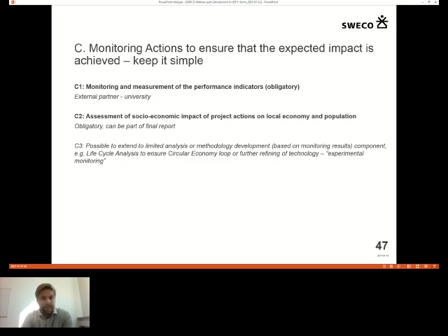Then the downside is that at least Swedish and German, many European universities need to have their overhead covered. They want 100% plus overhead in financing. And there is always a risk that you have to subsidize them a bit to make them come into the project. But still, this will be cheaper in many cases than subcontracting it to a consultant, and you use a PhD. So for monitoring actions, not a bad idea to look into external partners. This could also provide some transnationality to the project.